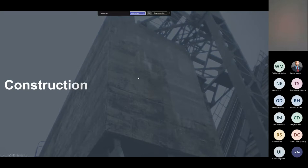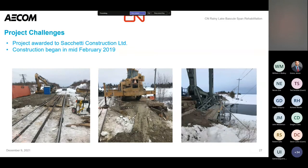That covers the design side. Construction was awarded to Sekedi Construction Limited, a contractor out of Canada who had done a number of projects for CN. They were very familiar with working on and around the railroad, which was a major benefit. They did a great job. Construction began in mid-February 2019 — inspection was summer 2018, design in the fall, and CN got it advertised and selected the contractor to move out in mid-February 2019.